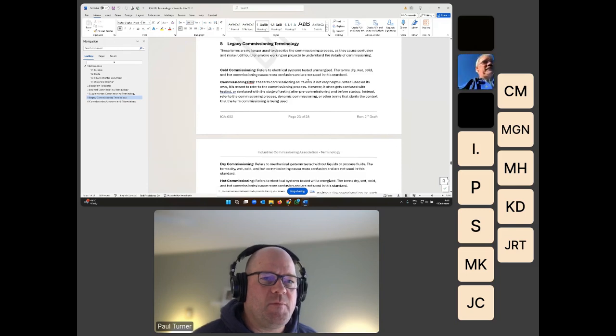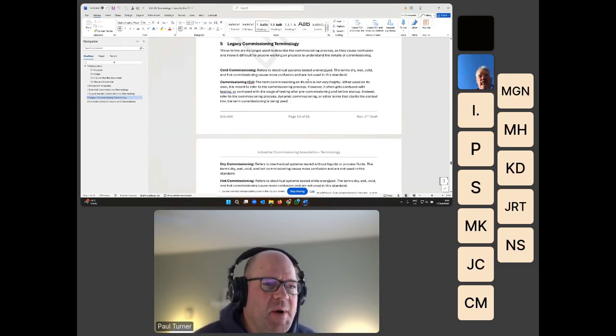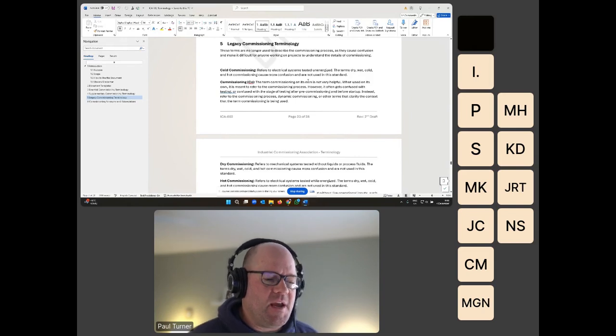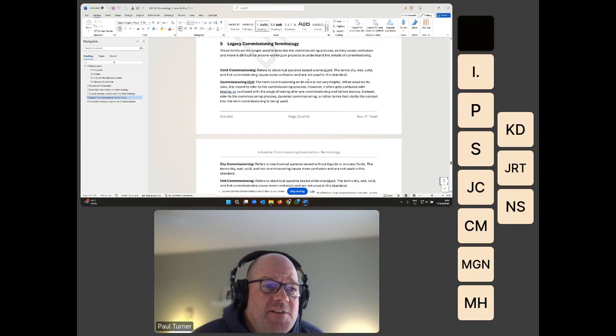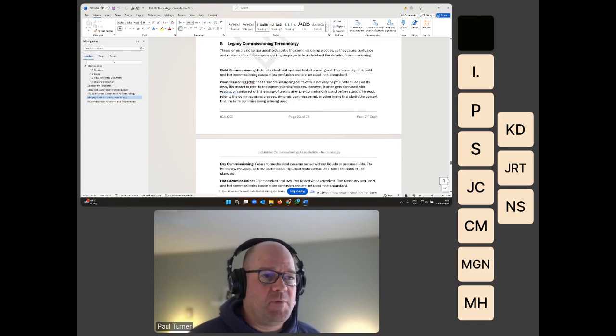So a lot of the commissioning terms that have been out there, we've been using them for decades, but they're actually causing a lot of confusion. And when these terms are bounced around, it's hard to know exactly what people are talking about. And the first primary example is the term commissioning on its own. Commissioning on its own, that term isn't really all that helpful, because what it's meant to refer to is the overall commissioning process, but I hear it often being referred to as testing, as people are doing commissioning on site. What they really mean is they're testing instrumentation or performing a high pot test. And of course, testing is one part of the commissioning process, but it's just one part, right?